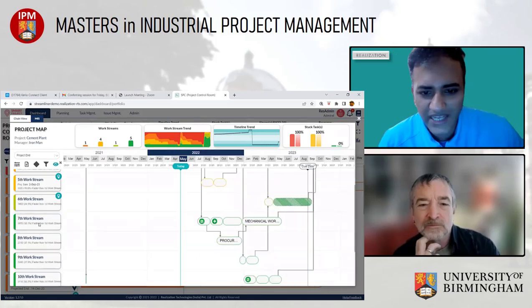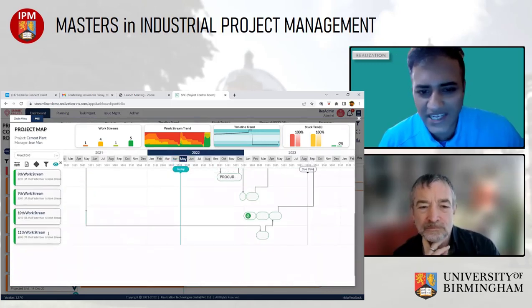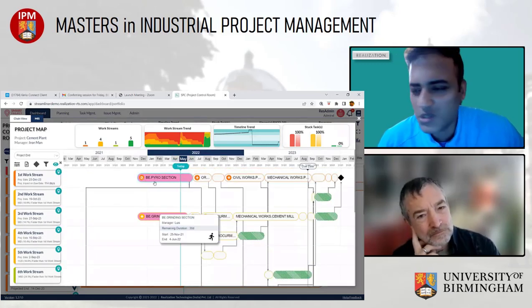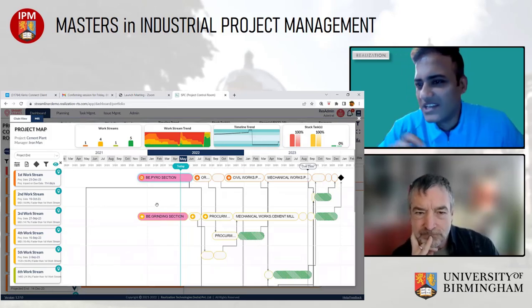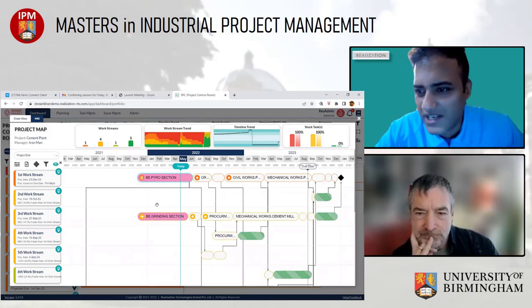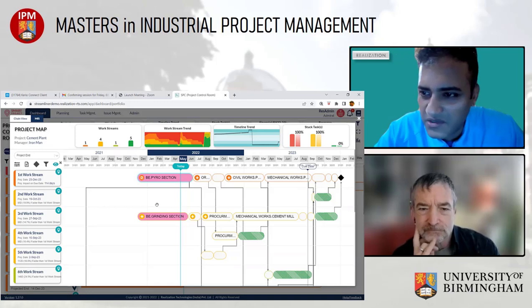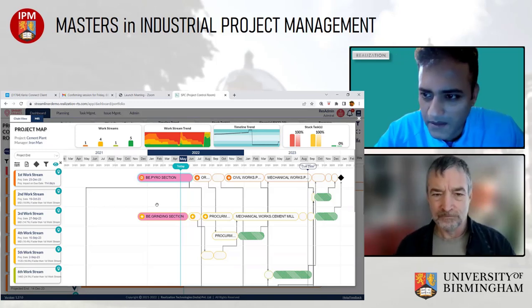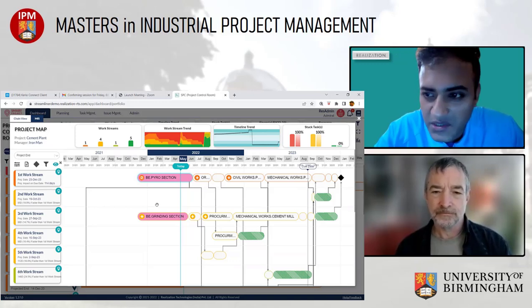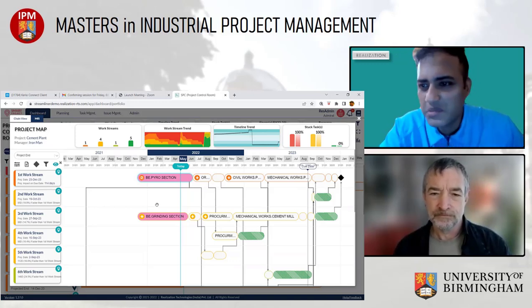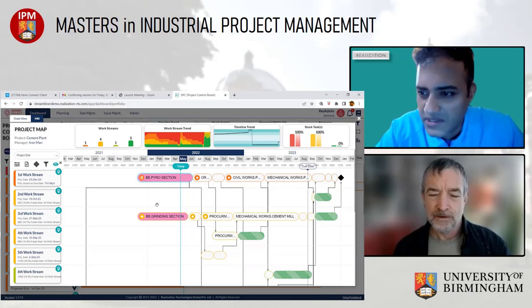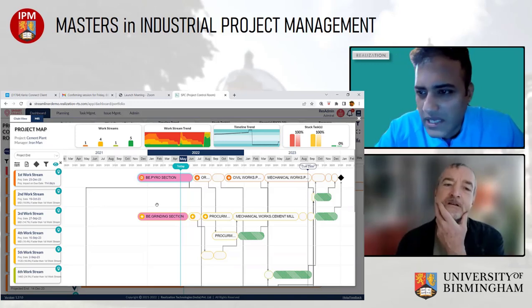I can expect to see stuck tasks below. I can see nothing is stuck below. The two most priority ones are stuck. So then I should be starting to doubt whether I'm really doing focus and finish on the ground or not. So it is not just about allocating resources, but also if there are resources that are facing any issues, management should be solving the issue at super fast pace. Yeah, and obviously that is not happening.